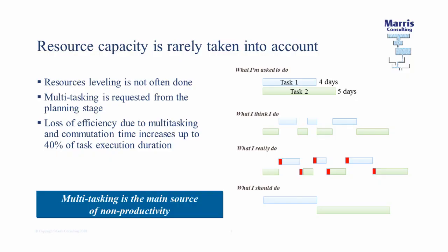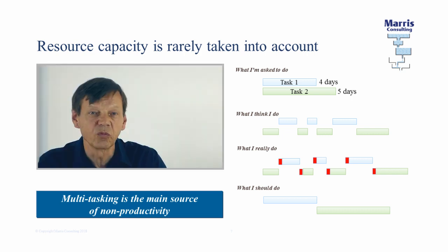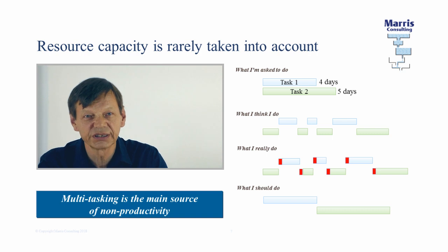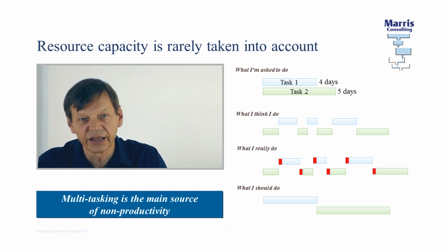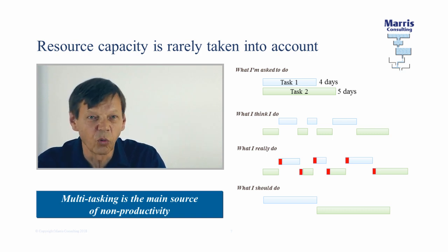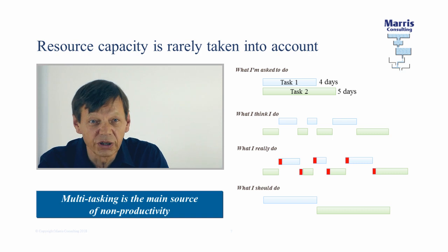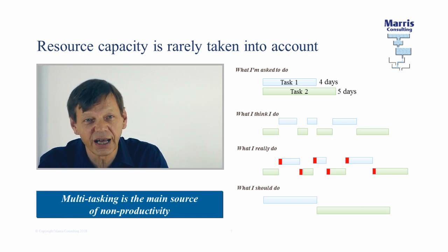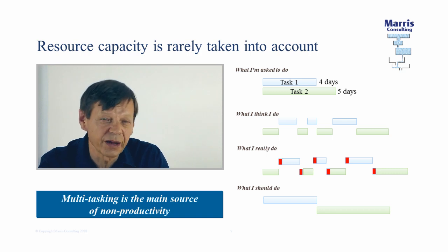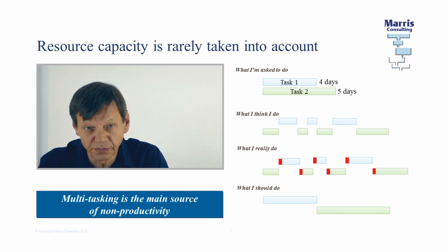Okay. Let's imagine that somebody ends up with work planned on 2 different projects simultaneously. And that happens all the time. It might even be a lot more than 2 projects, in fact, because although software can level out the work and ensure that that doesn't happen in the planning, it's very, very rarely done that way, and we usually leave the problem to the people who will ensure the execution.